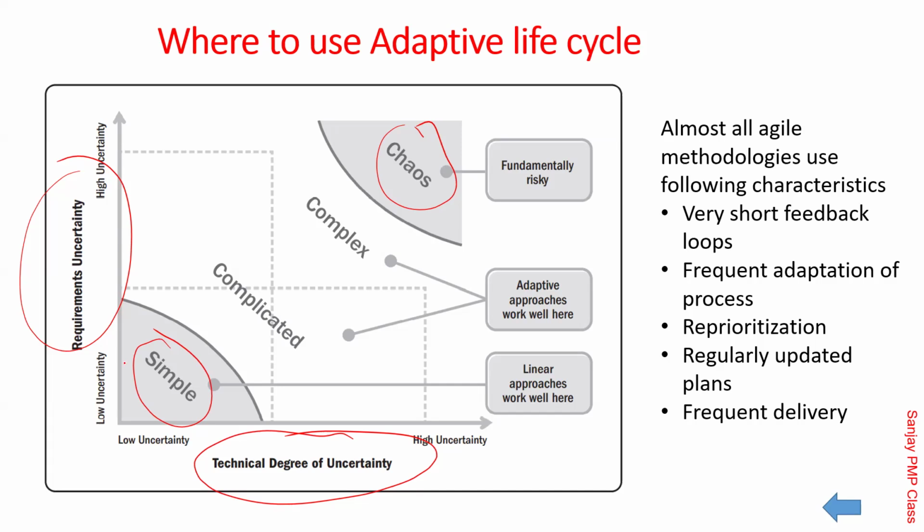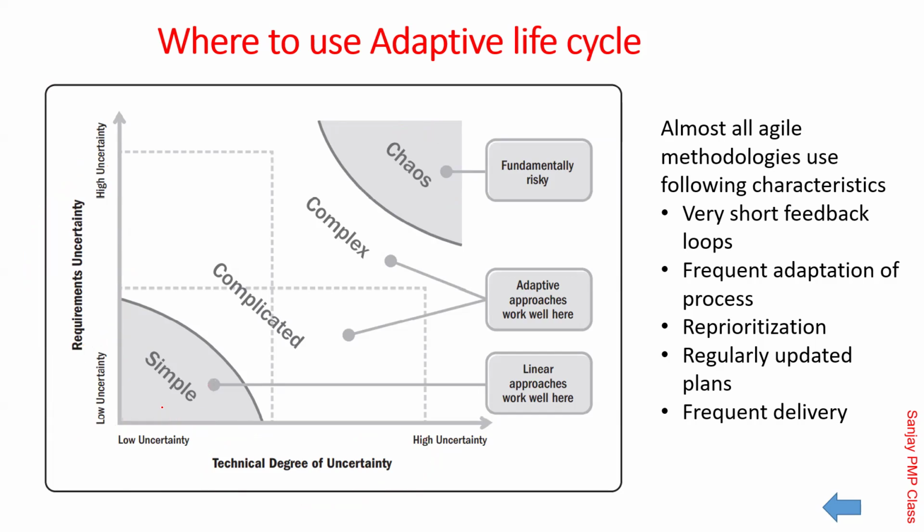So, as I was saying, when your requirements are frozen and your technology is extremely established, it's a good time to use the predictive life cycle, which means the traditional way. The reason is very simple: you will be able to save cost. Remember, if you get an opportunity to plan something in the future, your cost reduces, because you can plan the resources and the training for the staff.